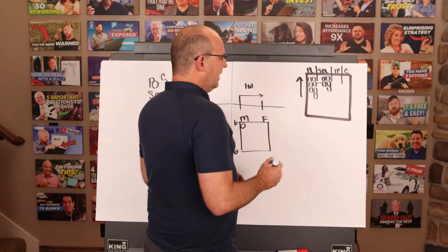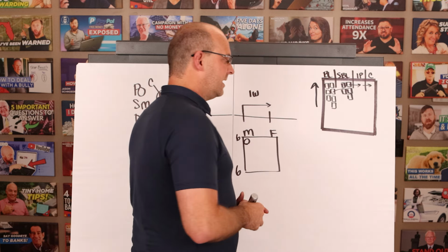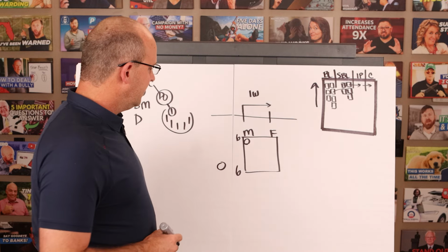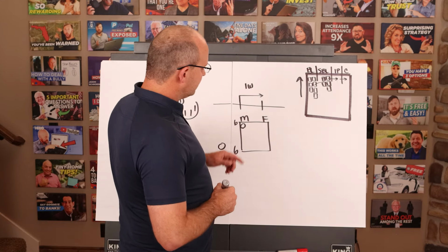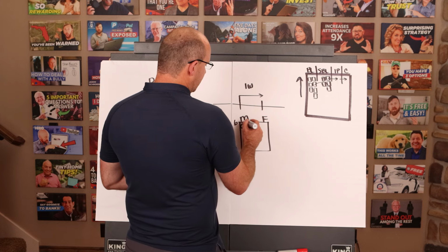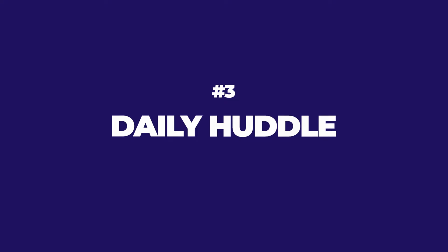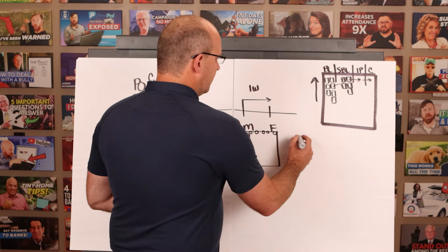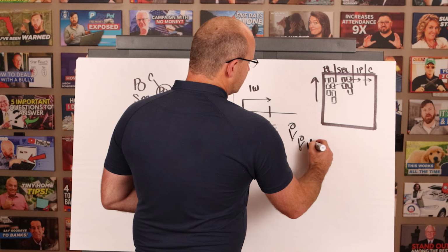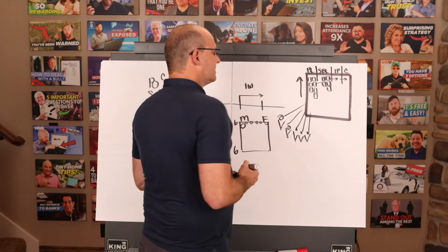And the purpose is, throughout the week, what you'll want to do is start moving these over to the in progress and complete column, making sure that you're working in one piece, one process flow here. And so this plans the entire what the team is going to do throughout the week. Now, every day you have a daily huddle, these little check-ins where the team in a fun and collaborative way will go ahead and look at the board. Let me go ahead and draw that and basically report on where they are and ask for help and say, hey, this is how we're trending.